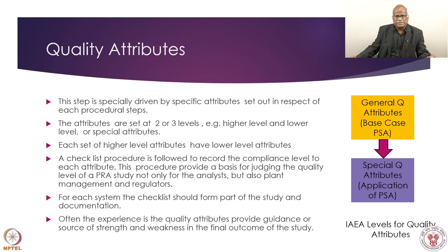For each system, the checklist should be part of it. If quality attributes are there with me, and I am doing an analysis for a class emergency power supply system, and I attach a list of attributes and see how far I was able to address them, it is a very good practice which helps the team also, to know what quality level we have achieved, and it helps even the independent agency when they review it.